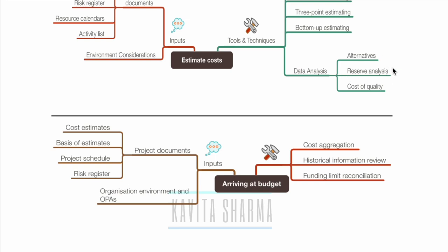Reserve analysis, you guys know now what reserve analysis is: looking at what can go wrong and how much money I should put in to withstand that risk. A risk is people leaving the company, or people not being skilled. So you might want to have reserves to counter it. You would have trainings, you would have backup resources, and so on. So those reserves are used here.